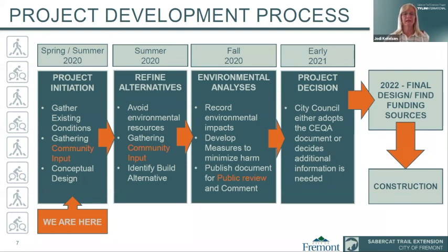Then my group, I have a team of analysts and scientists that will record the environmental impacts were we to construct this project. So the operational impacts, the construction impacts, the change to the transportation system, all of those will be recorded into an environmental document for your review for approximately 30 days. After we hear your comments and respond to those comments, then we will be presenting to the City Council, and they will choose to adopt the CEQA document or not.